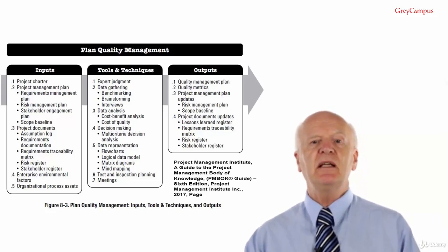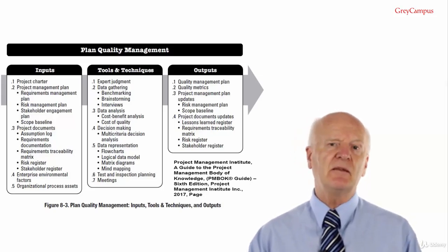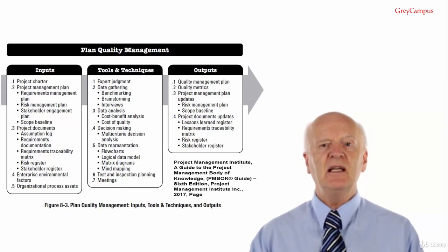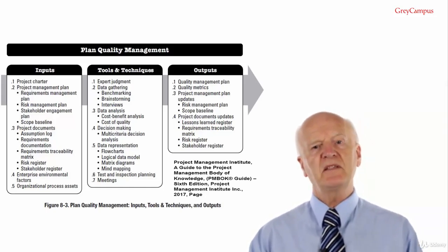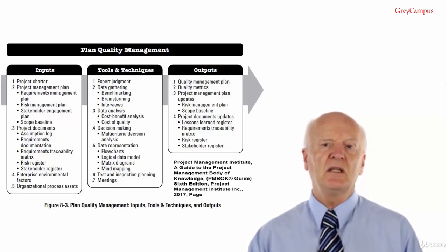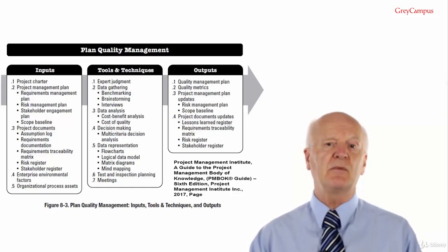The scope statement includes the acceptance criteria for the deliverables, and all of these criteria must be met, which is why they are called acceptance criteria. It means the product will not be accepted if they aren't. But keep a careful eye on the criteria. Make sure you're meeting stakeholder needs and not stakeholder greeds, because unnecessary criteria will burden the project in terms of time and cost and probably unnecessary work.